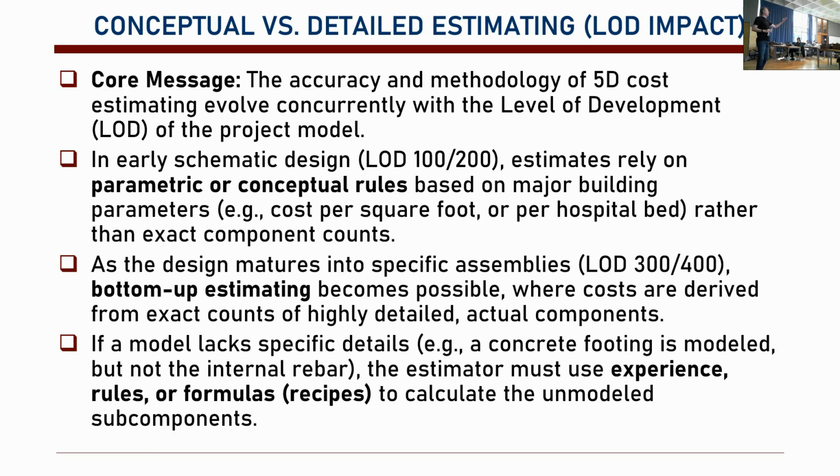If you ask some person, well, I'm going to build a villa, and they ask how many square meters, you say like 200 square meters. And then they say, well, per square meter, you will be spending like 20,000 to 30,000 liras. Rough estimation. In total, it's going to cost you like 4 million to 6 million.